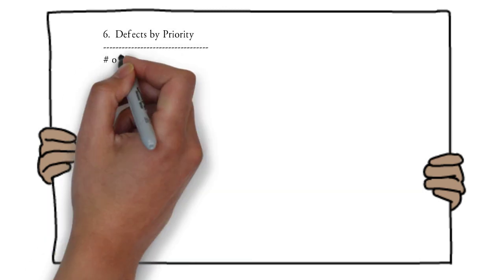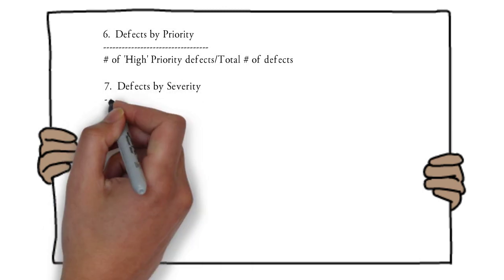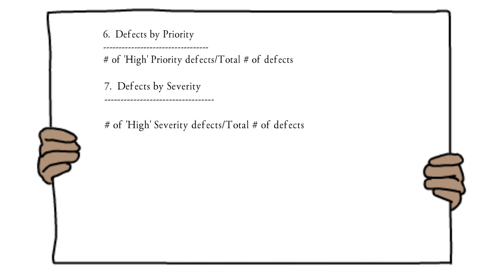When testers raise a defect, they assign priority and severity. Defects by priority and defects by severity can be measured. For high priority defects: (number of high priority defects / total number of defects) × 100. Similarly, high severity defect percentage = (number of high severity defects / total defects) × 100. This formula applies to any severity and priority status.